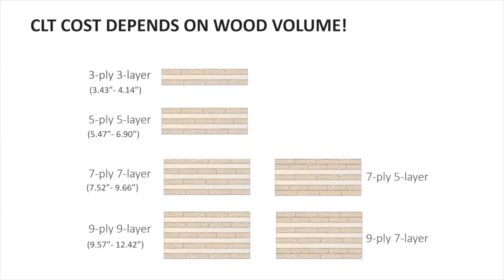Another key and huge takeaway, if you take away one key thing from this, it's that the CLT cost or mass timber cost in general depends on wood volume. It really is the driving factor, the amount of wood fiber in the product.